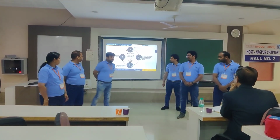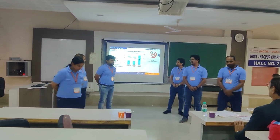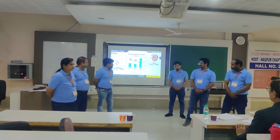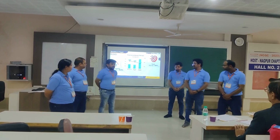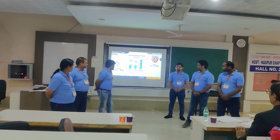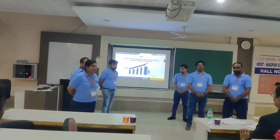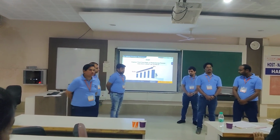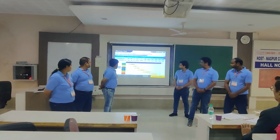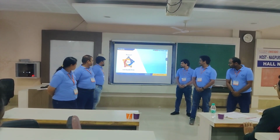Having understood the qualitative importance of root survey, we have also analyzed the data part, and we have found that the root survey FTR is quite low, that is 78.5%. So we have targeted that we will achieve 90% FTR in Q1 of 2023 to meet our overall site level target of 97%. The redefined problem statement is: improve first time right in root survey process from 78.5 to 90% by 15th Feb 23. We have also chalked out our milestone chart to make it time-bound, and here it is.